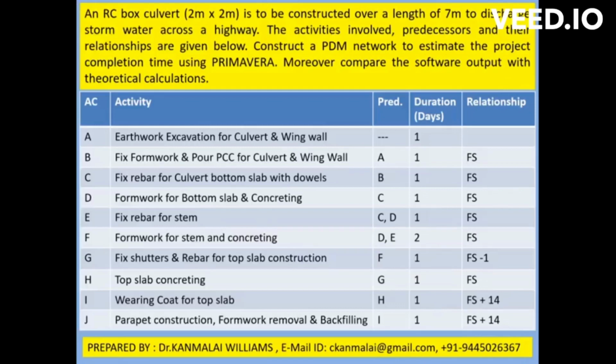Similarly, the duration of each activity is given here. And the relationship, that is finish to start or finish to finish, the relationship between two successive activities, is given here. And there is also a lead and a lag.